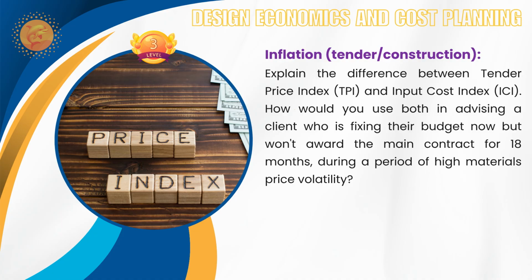So they price at a higher level. If it is very difficult, nobody is getting jobs and the market is very slow, you are in the financial cycle at the low end, then everybody wants to get the job. So they will go down and reduce their markup and profit range, and it may go very close to the cost. In that case, the tender price index will be closer to the cost. Otherwise, it will be away from the cost. It will be very high.